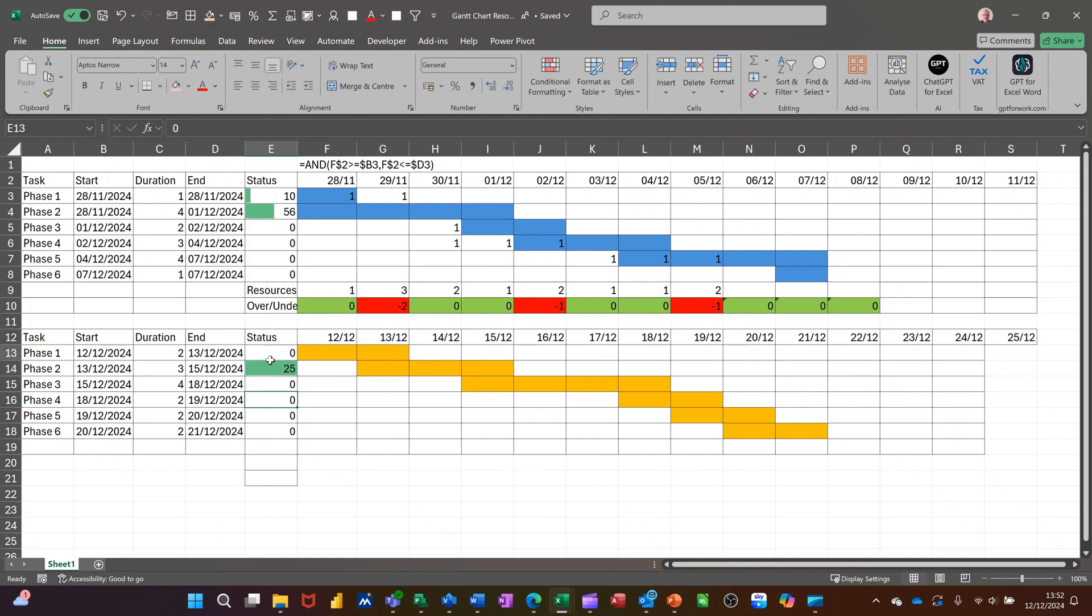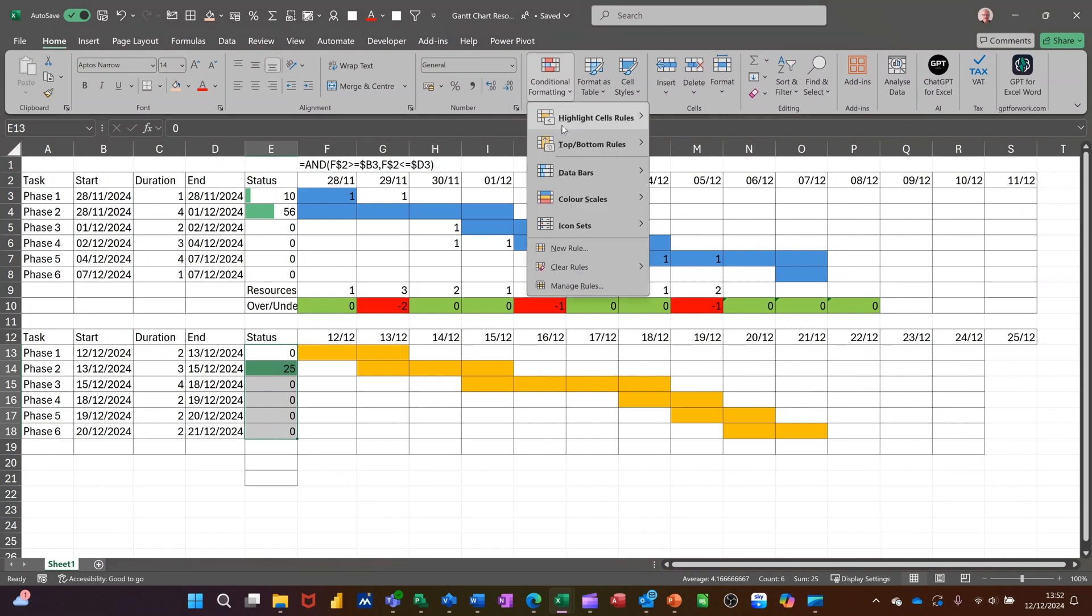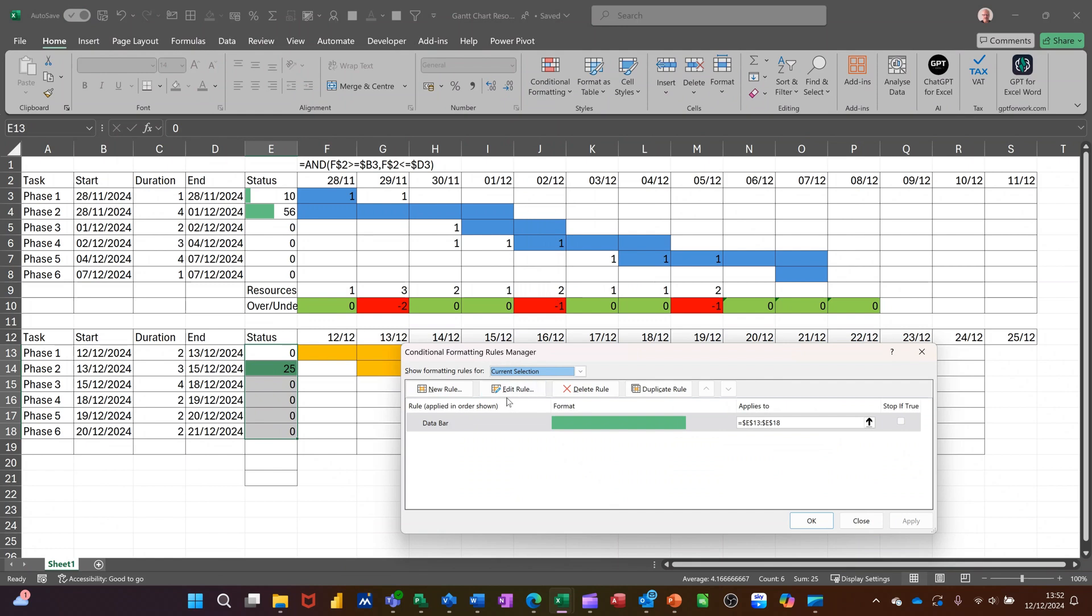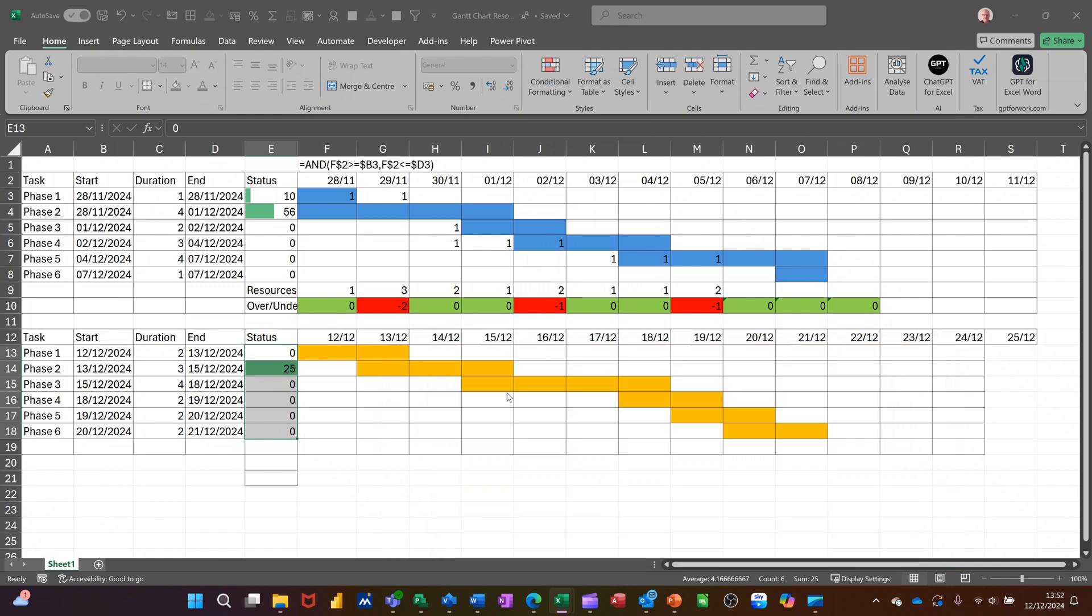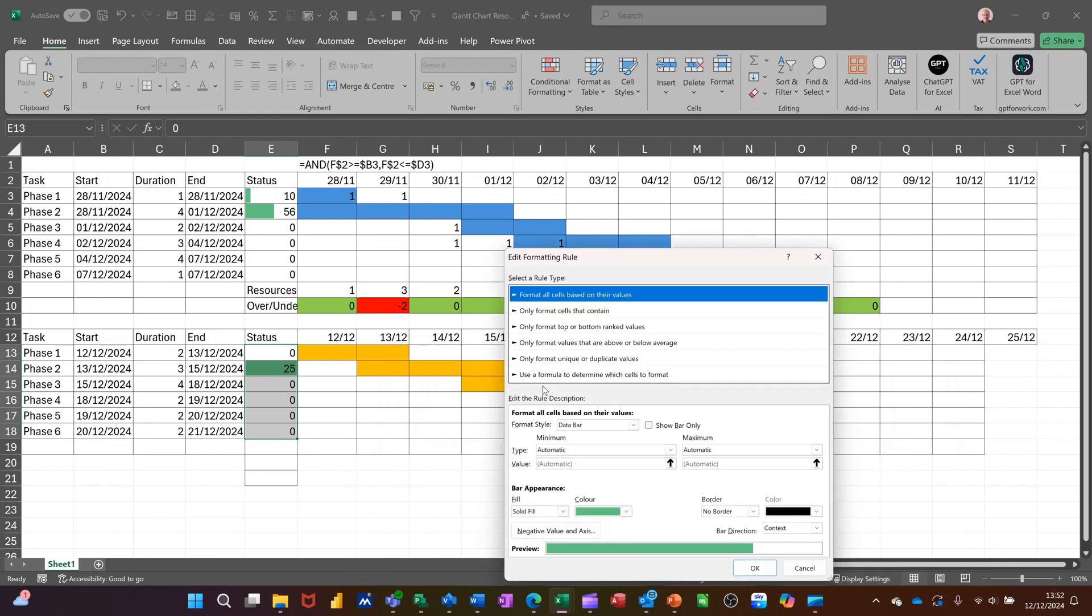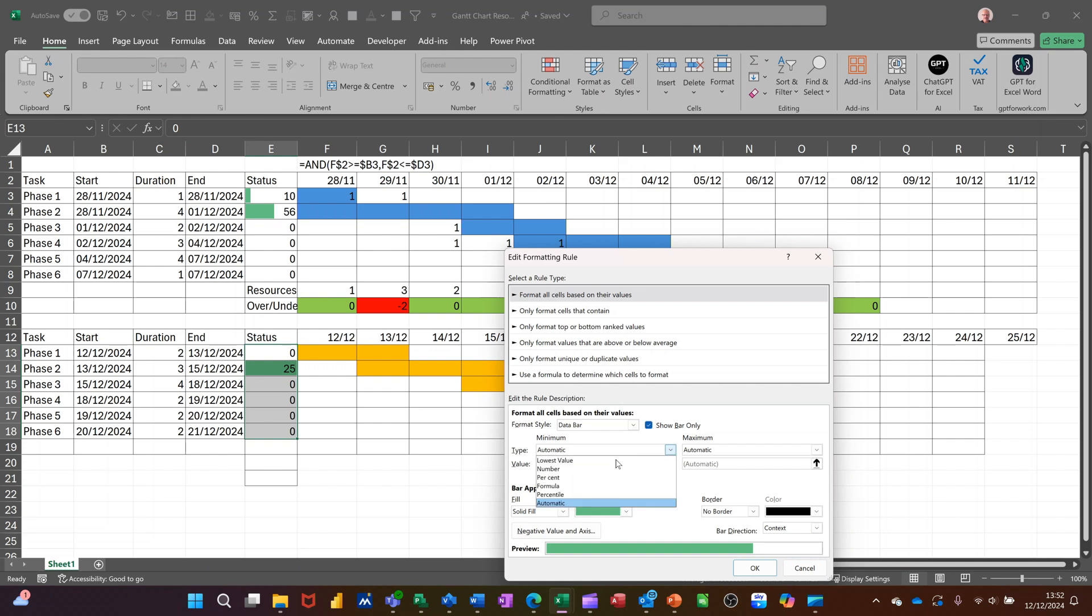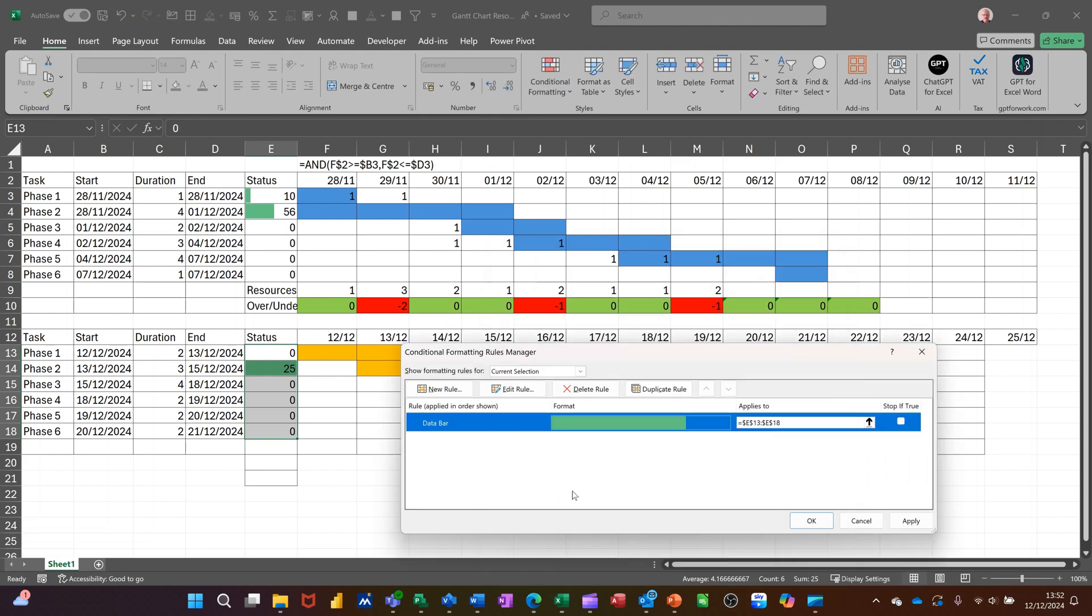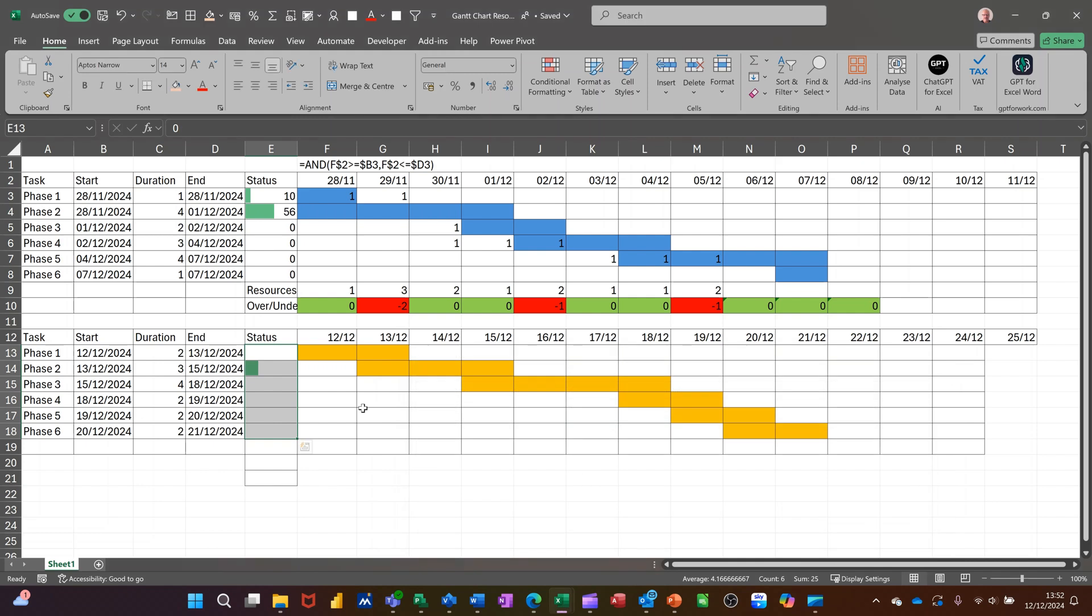And just to make sure this works. If I put that to 25, you can see the bar coming right across. I don't want it to come across. And I also don't want that figure on there either. So I'm going in there. I'm going to manage rules. I'm editing this rule. I'm going to put that tick on there. I'm going to change automatic to number. And automatic to number. And put the top one onto 100. So 100 would be like 100% complete. Click OK to that. OK again.